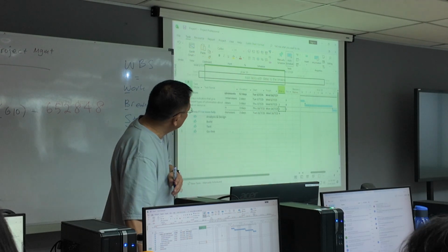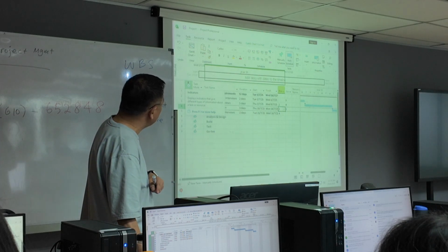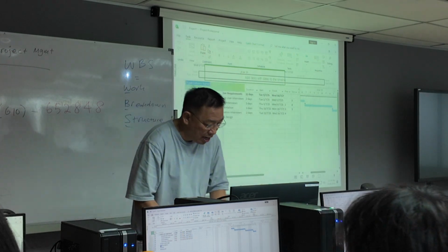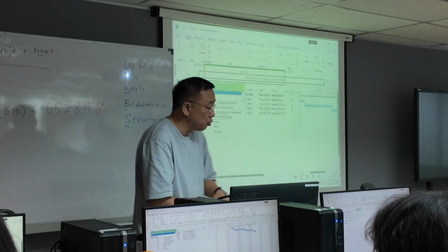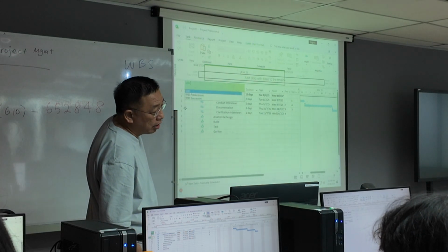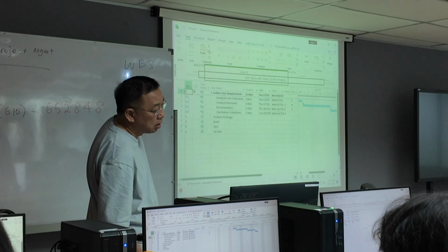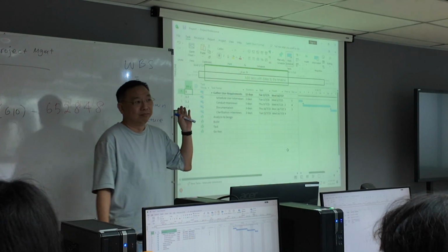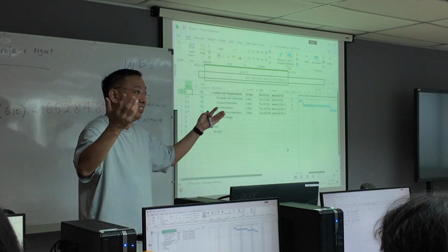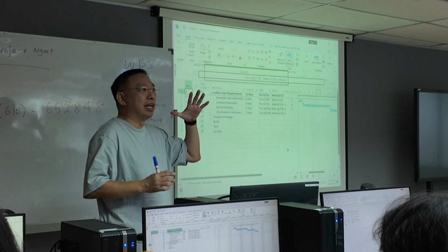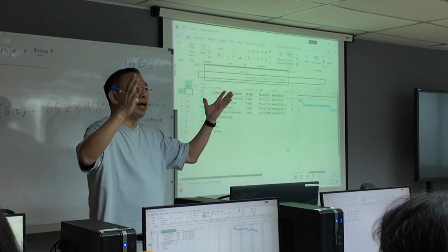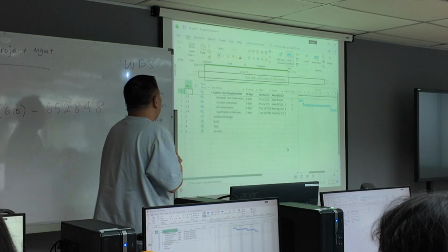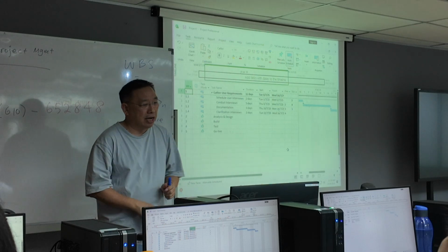So what you have to do is go to the first column. I always like to put it in the first column. Insert a column and look for WBS, and there's one, the first one. When you include the WBS, you notice it automatically does the numbering for you. That's all it is. Okay? But it helps you think in terms of, for a project, I always have major tasks and then I have subtasks. And this helps you very easily organize it.